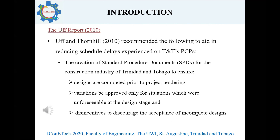Back to the Off Report. In addition to identifying the issues involved with schedule delays, they went further to recommend steps to aid in reducing the schedule delays experienced. One of the main recommendations was the creation of a standard procedure document for the construction industry of Trinidad and Tobago, which should ensure that designs are completed prior to project tendering, variations be approved only for situations foreseeable at the design stage, and incentives to discourage the acceptance of incomplete designs.